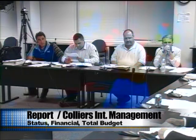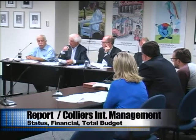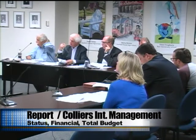So your risk is reduced? Absolutely. With being billed at 52%, and we've only used 3% of our contingency, roughly, absolutely our exposure is reduced. There are projects that get at the 80-90% complete mark, and the owner looks at the CM and says, okay, I want you to shift some of your contingency over. What is your experience, and particularly in public projects, regarding that? I'll let Ken speak to that.